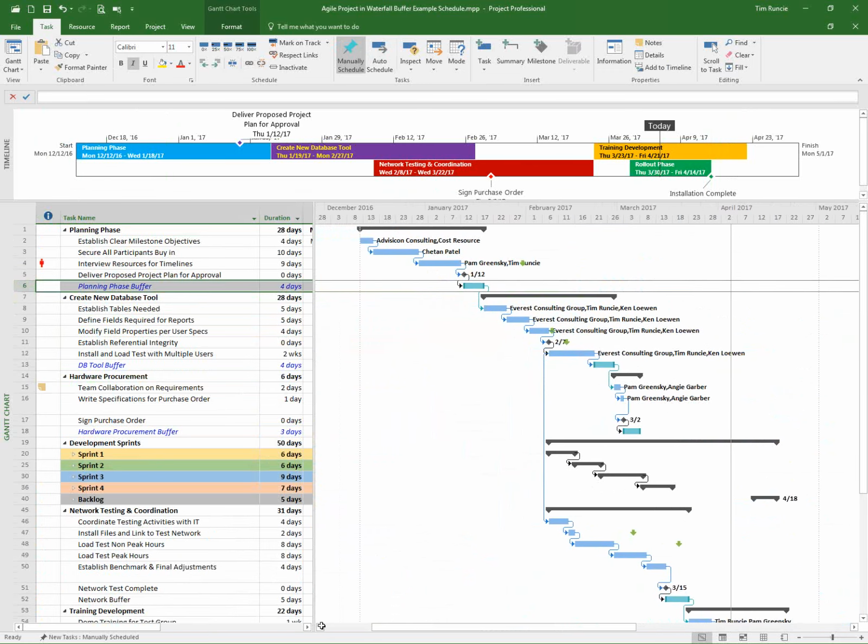The idea is that if we think about lean estimating, meaning that we're thinking about critical chain or critical planning, I want to surface estimates as accurately as possible, right? We want to get to a single source of truth. And so if you're interviewing your technical resources, it may be a little more of an art and a science. You ask, well, how long is this going to take? And they say, well, this will take 5 weeks. And you go, 5 weeks, how confident are you? Can you give me a low or medium or high? And you begin to have this dialogue of asking questions.